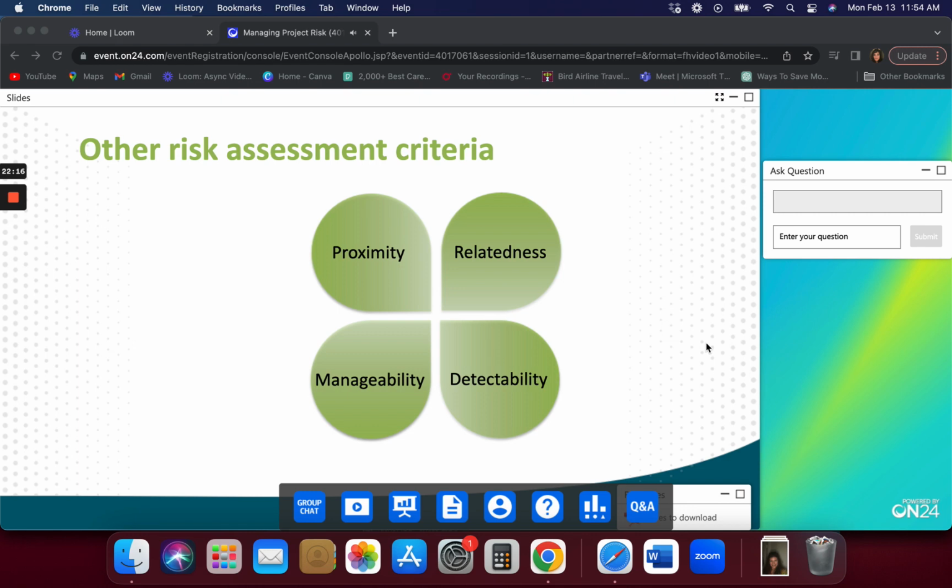So it is something that we could say, should we not afford urgency, if not importance, but urgency to those risks that would happen soonest? So that's what you would do if you had risks with the same PI cell. You'd look within that cell and say which one is going to happen soonest. Or you might say, let's look at relatedness.